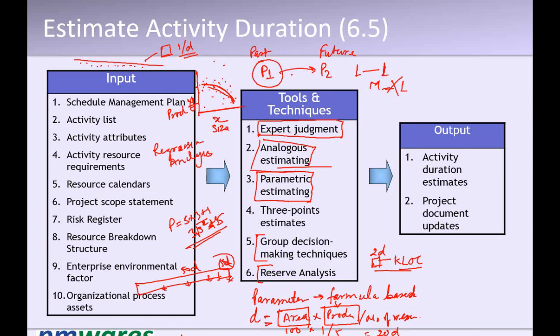So if the risk profile is average, you can go with the average allocation of the buffer, probably 10%. Some companies have 5% based on their own data. But 10% is normally a good buffer with an average risk profile. If the risk profile is higher, you may need a higher buffer. While if it's low, you can manage with a low buffer.